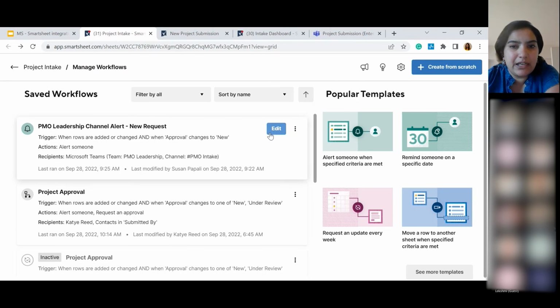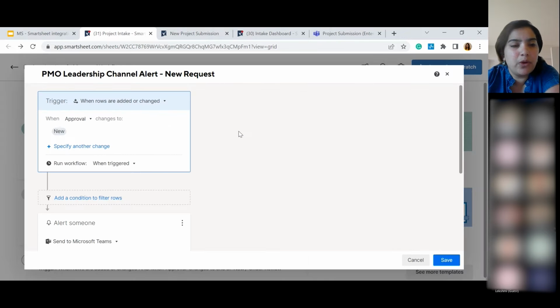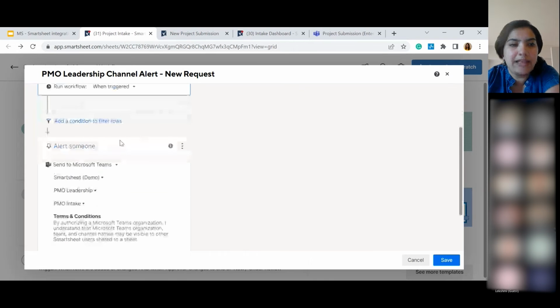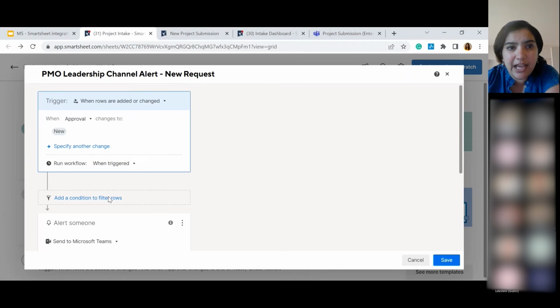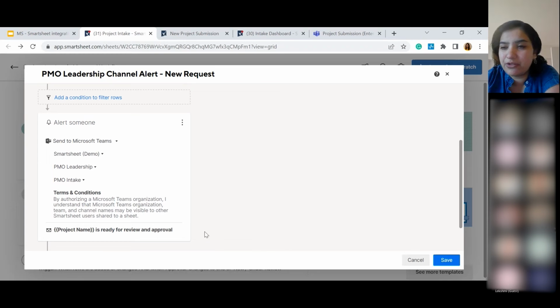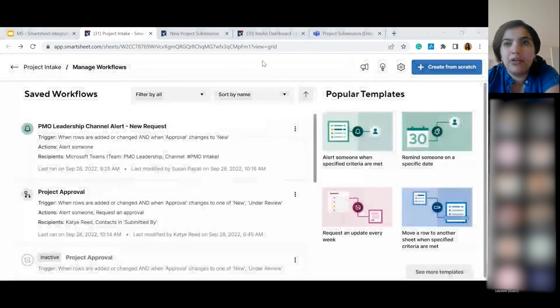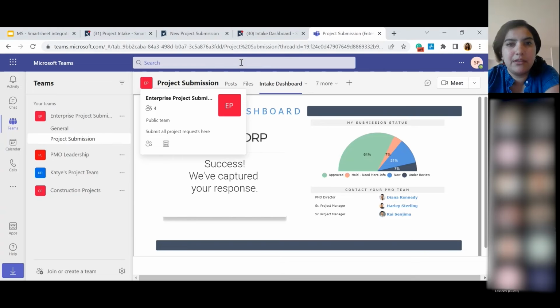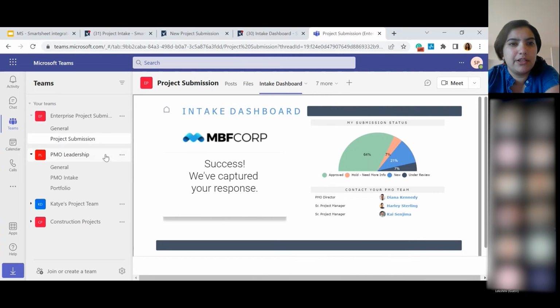I'd already pre-created this automation for the demo, but what we're doing here, we're going to send an alert to Microsoft Teams, to the PMO leadership channel. So every time a new project comes in, this channel will get notified that there is a request they need to review. All right, I'm going to save this. And I'm going to hop back to Teams. So this is the leadership channel. Let's give it a refresh.